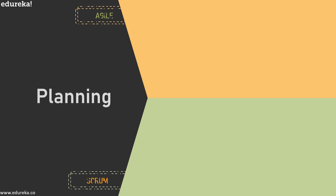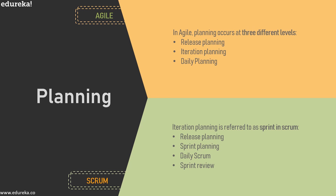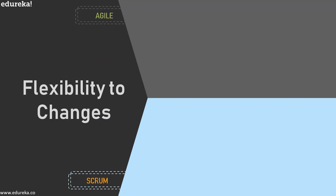The next difference is planning. The main essence of an Agile team is to produce recurring deliveries — continuous deliverables. To do that, planning in Agile occurs at three levels: release planning, iteration planning, and daily planning. Under Scrum, the next sprint is planned after the team has completed the current sprint activities. Scrum has four planning steps: release planning, sprint planning, daily scrum, and sprint review and retrospective. The key thing to understand is that in Scrum, the next sprint is planned after the team has completed the activities from the previous sprint.